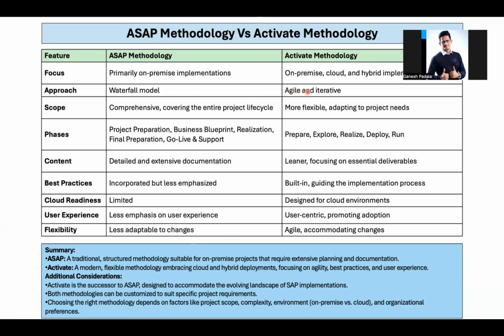Okay, and the sprint concept in public cloud might also be possible for certain areas. When I was working on one project, we had Salesforce simultaneously. We had SAP and they had Salesforce. For SAP, the entire thing moved almost like a waterfall. Although we had sprints, the entire configuration setup, everything was moved during the go live, like the final preparation time. But Salesforce used to move batch-wise to production.